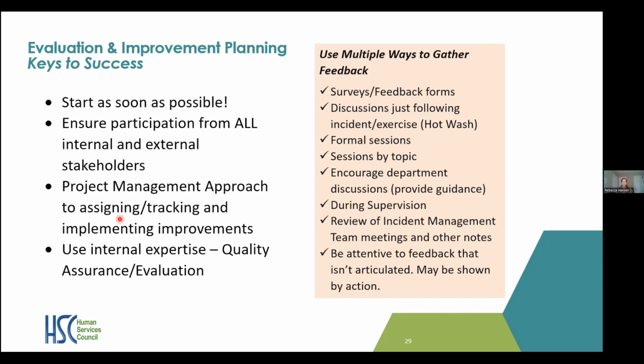One other thing that's really important is to offer lots of opportunities to give feedback. What we really want to get is honest feedback, and sometimes people can't do that if they need to stand in front of their supervisor or in front of other people. So making sure there are some anonymous ways to provide feedback, like through a survey or different forms, is a great opportunity. And then you can also have some formal sessions. You can organize by topic or by department, bring people together and start talking through some of their experiences and ways that they think it can be improved.